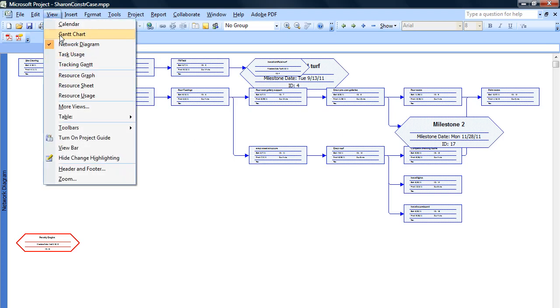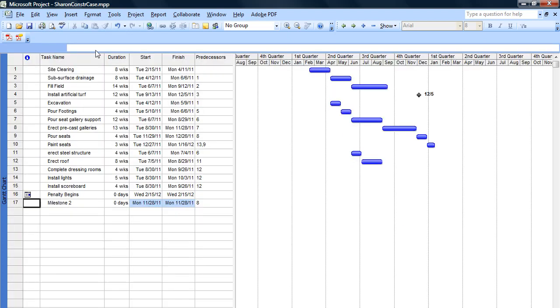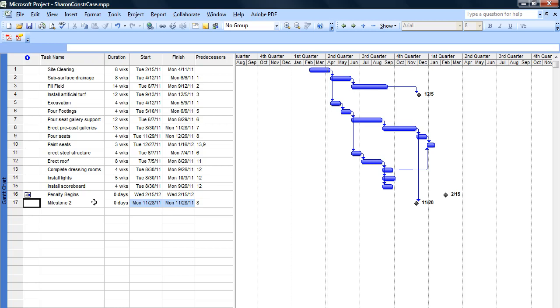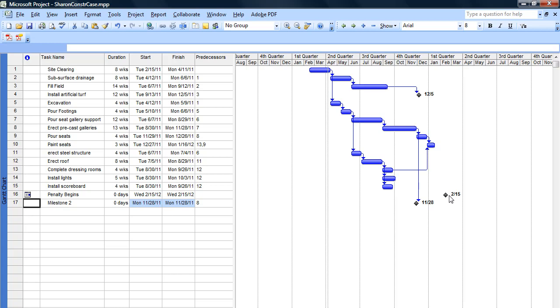Go back to our view Gantt chart. Now, if you notice, there already was another milestone here designated, and it's floating out here by itself. This is when a penalty begins, so I wanted to highlight within the schedule that if we aren't completed on time, any work completed after 2.15 will incur a penalty, so that's the way to peg a date out in the future, is to also call that a milestone.